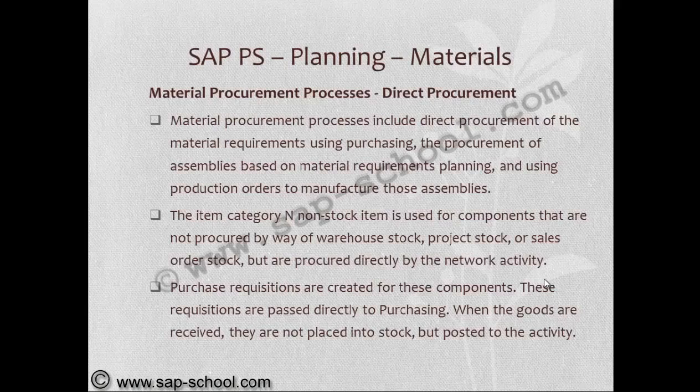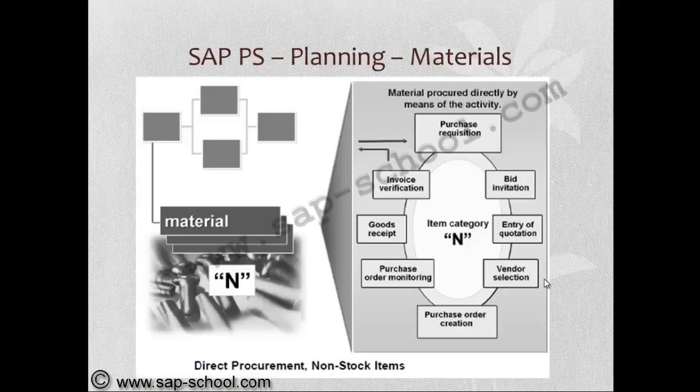Purchase requisitions are created for these components. These requisitions are passed directly to purchasing. When the goods are received, they are not placed into stock but posted to the activity.